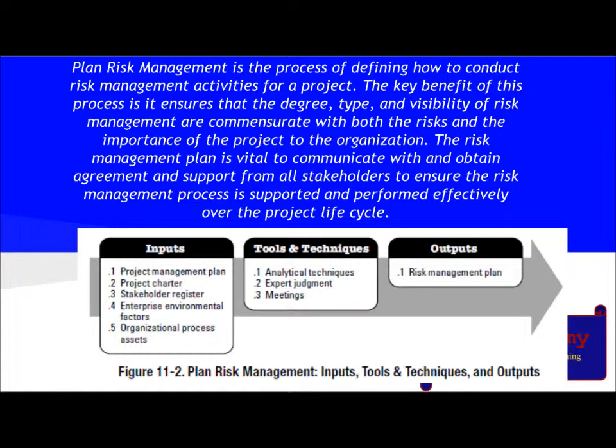The inputs involved are project management plan, project charter, project stakeholder register, enterprise environmental factors, and organizational process assets. The tools and techniques involved are analytical techniques, expert judgment, and meetings. The output is the risk management plan.